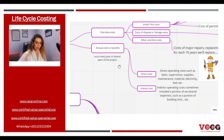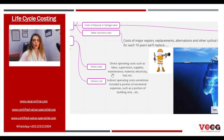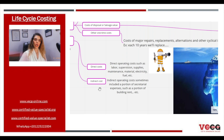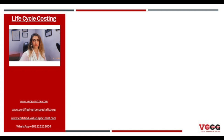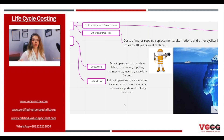What is the difference between direct and indirect costs? The main difference is that direct costs refer to all costs that we can allocate to a specific project. But indirect costs are costs that we could not allocate to a specific project. For example, if we are a construction company with many projects and we are paying annual rent, those rent expenses will be prorated to all projects, because we are not able to allocate them to a specific project.